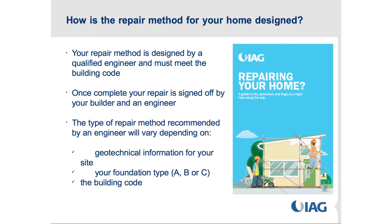So the repair method. Your repair method is designed by an engineer, and this is the important thing. There's a lot of myth and conversation around insurers coming up with a design method that's not right for the conditions or not according to the building code. We have to work with engineers and the repair methodology has to meet the current building code. We get an engineer to do a PS1 engineering design, which says this is the design that must be taken to fix this damage, and then a PS4 which is an engineering sign-off to say the repair was done according to what needed to be done.